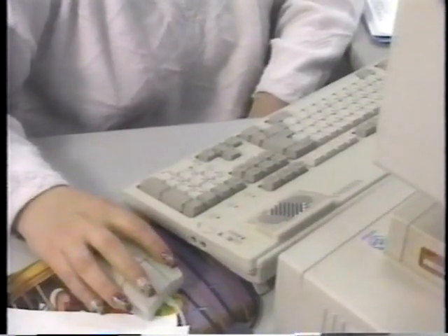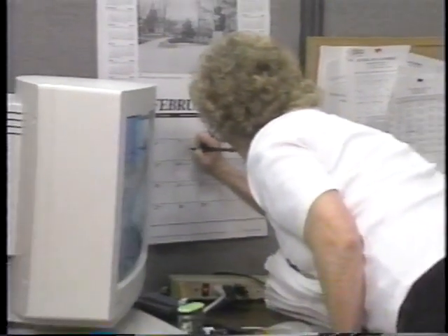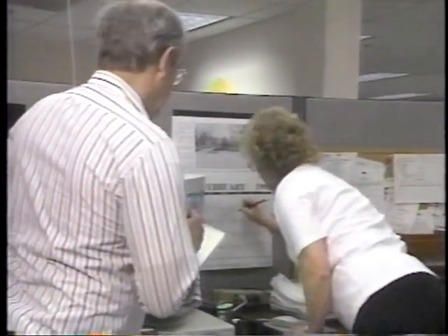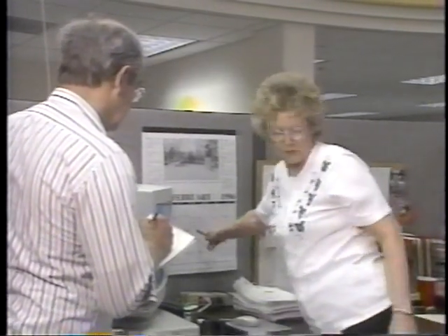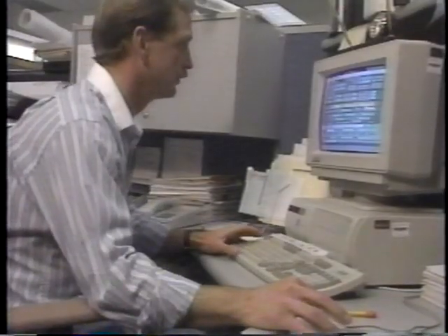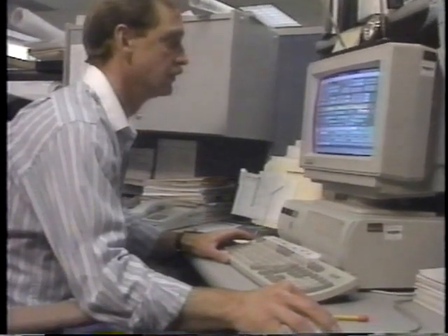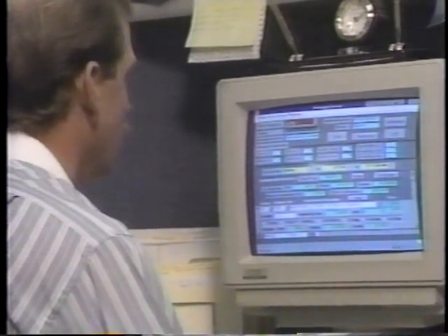It is not necessary to make computations for every month. Computations should be made for key months in the calendar year. The key months should represent the highest and lowest manpower requirements. The skill level requirements represent the ideal mix of employees. Actual staff capabilities may not meet the optimum requirements. Staff as close to the ideal as practical.